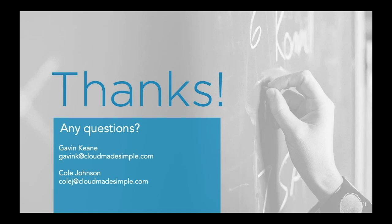Yeah, and I think we always try as much as we can to provide those cost estimates up front at the beginning as we can. But it does get a bit challenging if we don't get far enough into a project or do enough discovery or scoping, so that we can't provide accurate costs. As with any project in business, we need to learn a bit more about it before we can provide an accurate estimate. So we try as much as we can to provide that initial ballpark cost, so you know this is within our budget, and we can keep moving forward to define everything, and then work on the design and development of it.